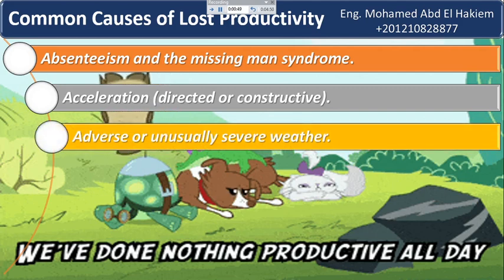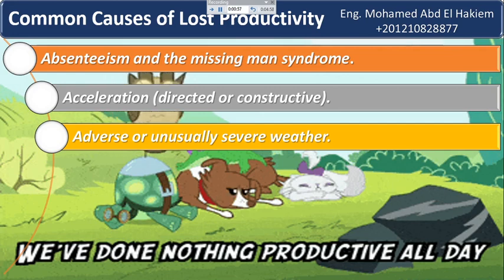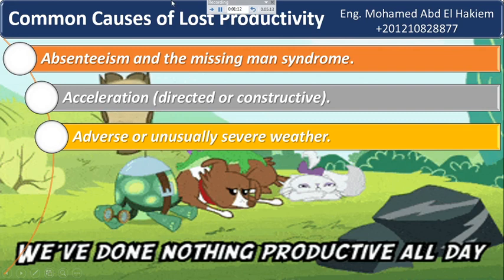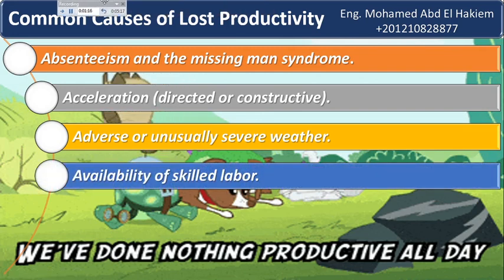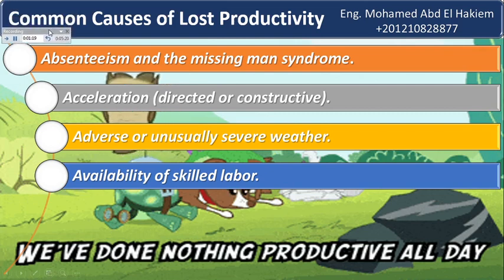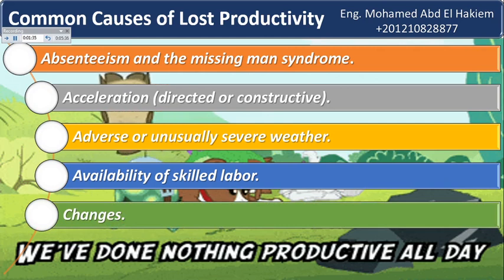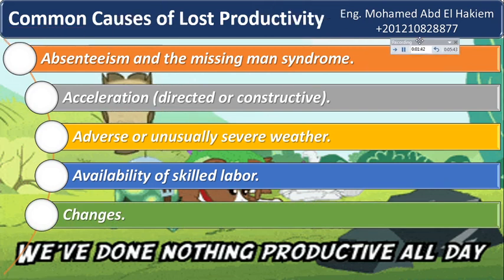Adverse or unusually severe weather — some bad weather is to be expected on almost every project, but pushing weather-sensitive work from good weather periods into periods of bad weather, or encountering unusually severe weather, may impact productivity. For example, earth backfill and compaction operations pushed into wet weather periods. Four: availability of skilled labor. A contractor must have sufficient skilled labor in the field; if skilled labor is unavailable and a contractor must use less skilled labor, productivity will probably be impacted. Five: changes. All projects encounter some change during construction; changes outside the scope of work, multiple changes, or the cumulative impact of changes may all impact productivity.